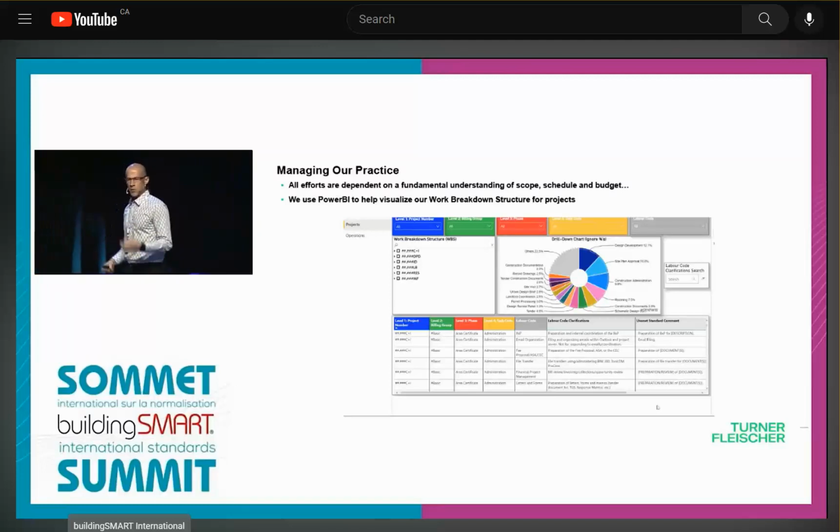So what does that mean? A laser scan. Awesome. You don't just go and scan. You plan it, you coordinate it, you scan it, you process it, you model it, and you deliver it. Those are 6 fundamental tasks that make a successful laser scan. And laser scan is just one small little BIM use of existing conditions of an overall project.